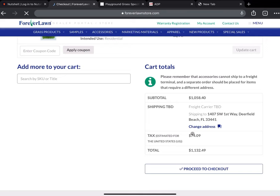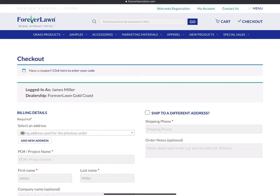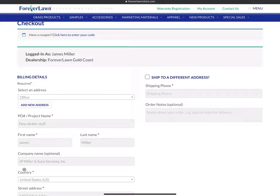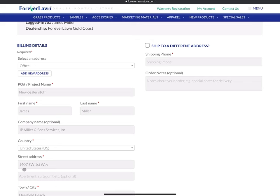In the checkout process here, we get it delivered to our office. We often only get it delivered to the office. There may be some commercial jobs where we would actually have it delivered to the job site. For residential, we do not.